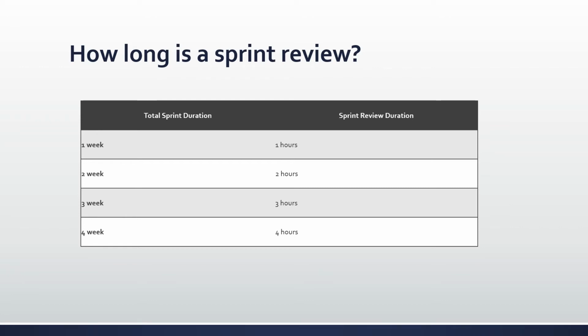If you have a 1-week sprint, you should have a 1-hour sprint review. If you have a 2-week sprint, you should have a 2-hour sprint review. 3 weeks, 3 hours, 4 weeks, 4 hours.